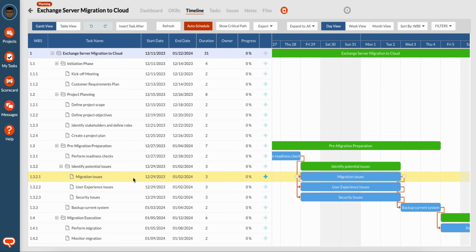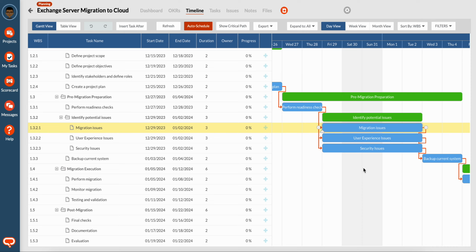So once we do that, we can hit the auto schedule button, and now we have a proper relationship with parallel starts, as well as the outbound side of that relationship, which is what future task is impacted by each of these tasks, which is something we must do to ensure that the critical path method that is used to calculate the schedule works correctly.